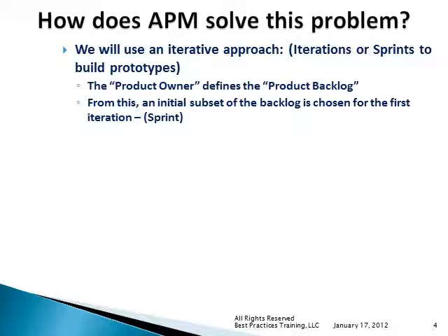We need a very empowered team working on that. Ideally, this should include a team of 7 or 8, perhaps 9 team members. They're all working at the same site, so they're all co-located. They're dedicated to this project. We need them to be dedicated, not multitasking, splitting their time between other project work and other activities. Again, we need a very high-energy, high-performing team. So we need this co-location. They need to be working together closely on this. The project manager is going to have a different role. The project manager, the scrum master, is going to work more as a facilitator, just ensuring that this high-energy, high-performance team has what they need and that there are no impediments that block their way.